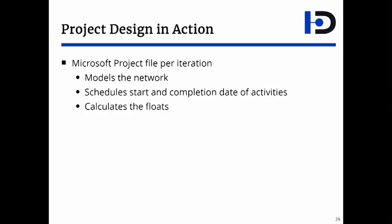For each iteration, you have a Microsoft Project file. The project file is there to model the network, to schedule the start and completion dates, to find the actual start and completion dates of activities, and to calculate the float.